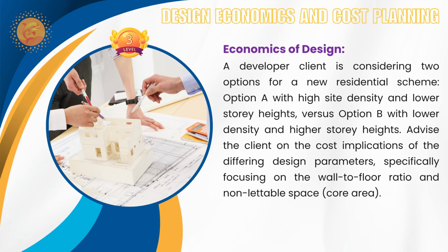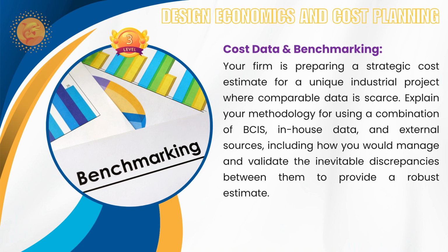So if there is nothing further, let us move on to the next question, which is about cost data and benchmarking. So always we have to do benchmarking to go ahead with the cost plan. That is to control the cost, because if we don't know what cost we are going to build, then it will be difficult to control. So we have to have some sort of benchmarking for the specific type of development.